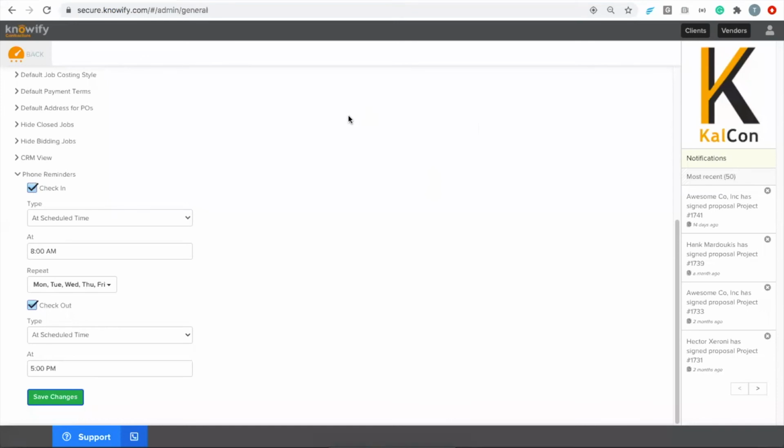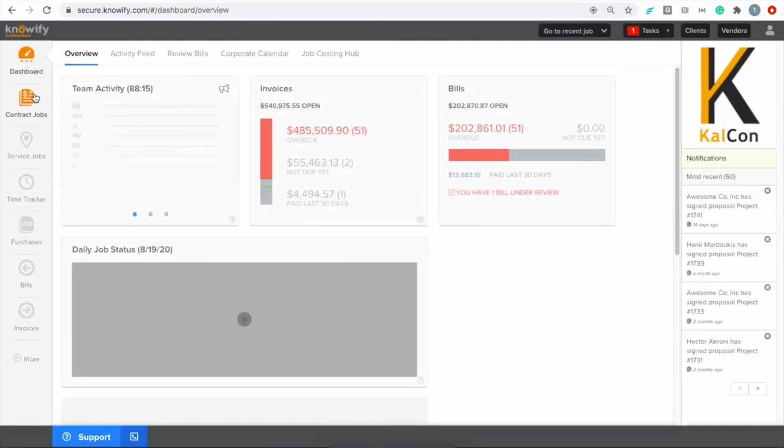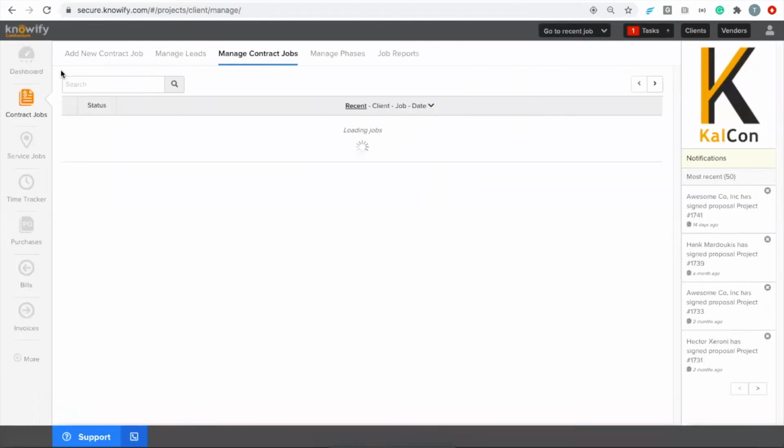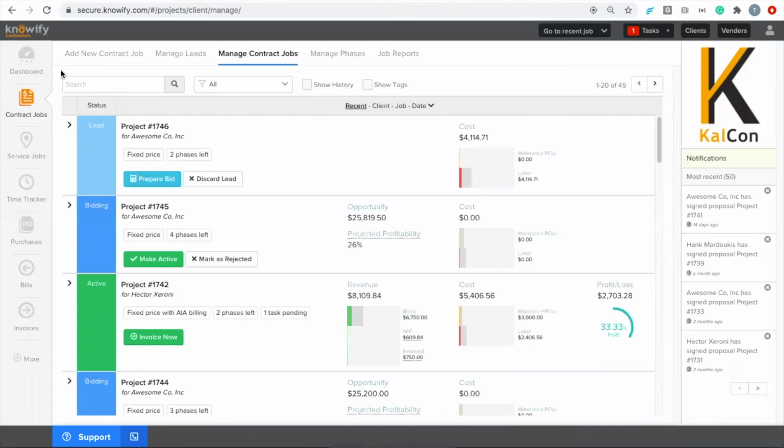There's a question about pulling up a P&L for a job in QBO to show how labor is showing sync from Knowify. When we push time to your QuickBooks account, it actually doesn't push with a dollar figure, because the weekly timesheet won't accept a dollar figure in this type of sync. So your P&L for a job is always going to be held in Knowify. That's really the idea, that Knowify is the job costing software, whereas QuickBooks is more of a back-end accounting software.